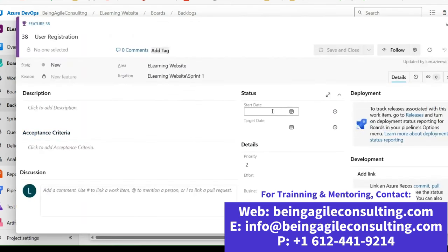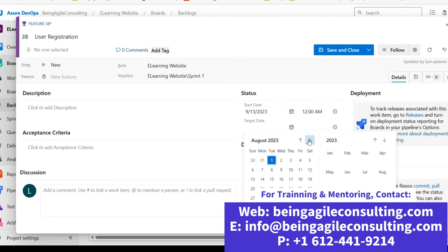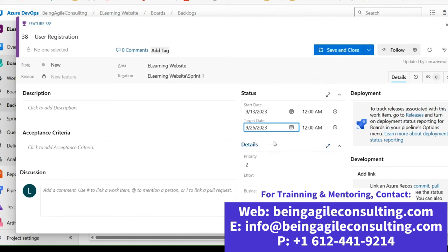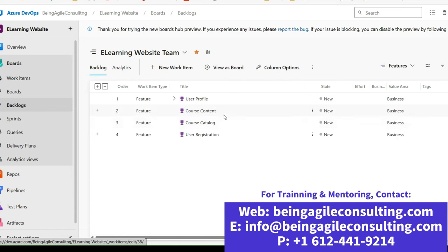For the last feature, we hope to start working on it from the 13th and complete it by the 26th. Now that you know how to set the dates, I want to emphasize: these dates are not fiction. It's recommended that they come from an empirical place, meaning the team should be the ones giving the estimated dates based on their history, previous work, and their estimates — not leadership sitting somewhere and putting in numbers without knowing the reality of the team.